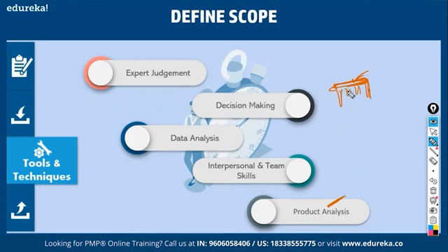So you break down the product into smaller and smaller components and you understand what value each of these product components contributes and what is the rate at which you can buy without compromising on quality. That is, you have to maximize value and minimize cost without compromising on quality. So this is what is called product analysis. Okay, so you have to do this product analysis. Some people call it value engineering, systems engineering, functional analysis, whatever it is, you have to do all this in order to define a product. So this is what is called product analysis, fine.